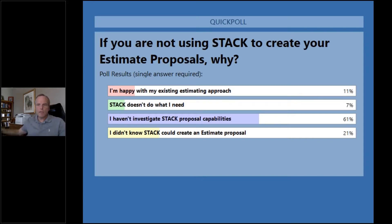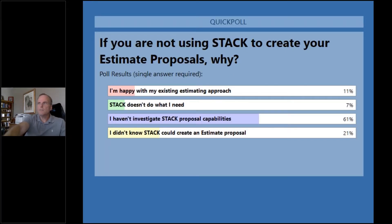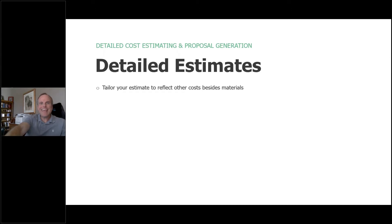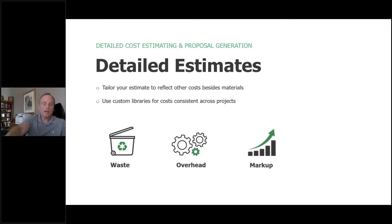We're going to leverage that information to help create some very detailed estimates. We're going to allow you to tailor your estimate to reflect how other costs besides materials are being handled. We'll use those custom libraries to ensure you have consistent costs across your projects, and we'll allow you to define other factors like waste, overhead, markup at an individual or overall perspective, and of course incorporate your sales tax.